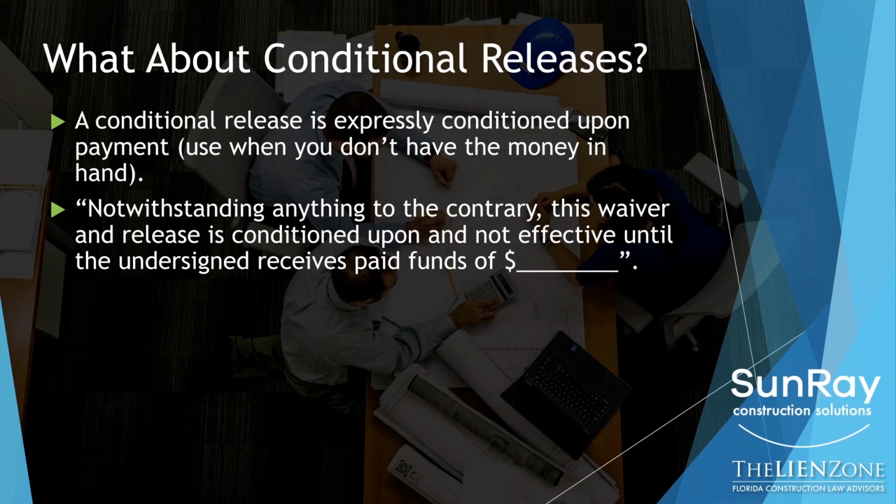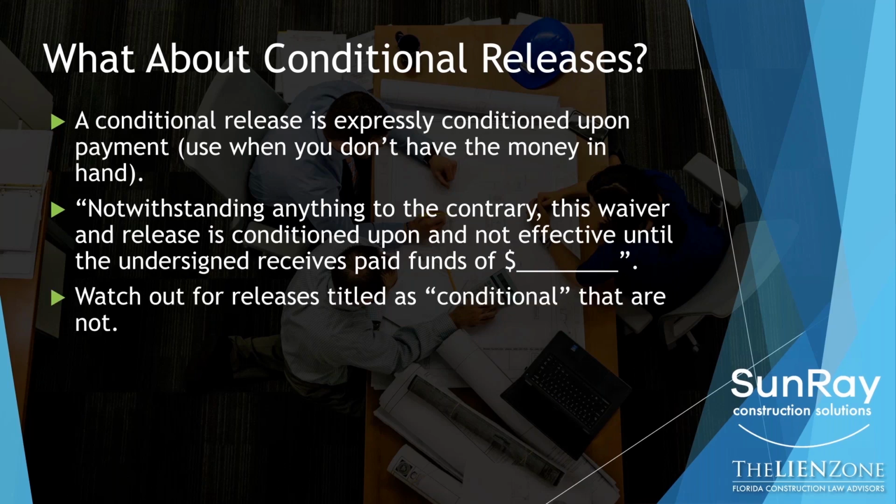And it says, notwithstanding anything to the contrary, this waiver and release is conditioned upon and not effective until the undersigned receives paid funds of, and there's a blank. So if you're expecting a $50,000 check and you provide a release in advance of getting the money, if you put this language in and say $50,000 in that blank, then until you get the $50,000, that release is not effective.